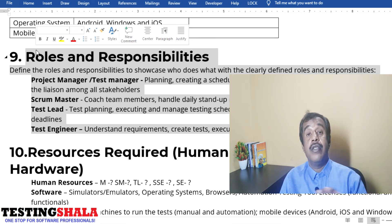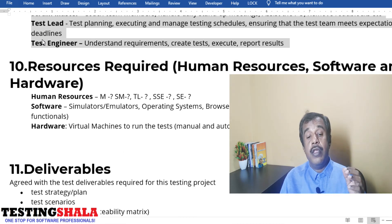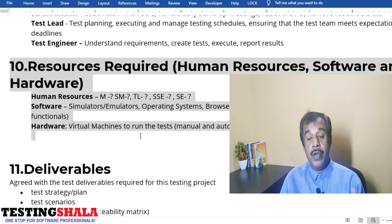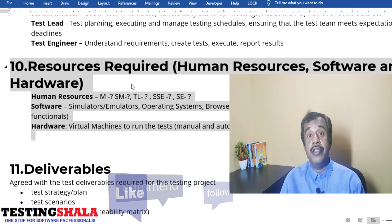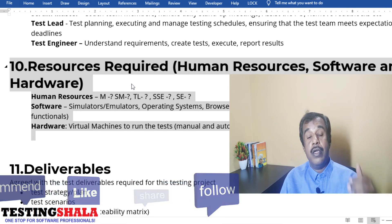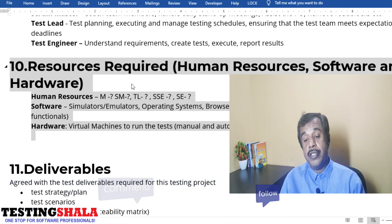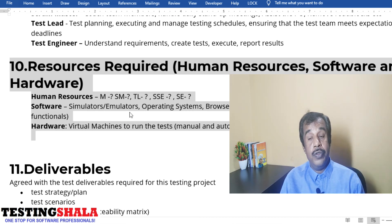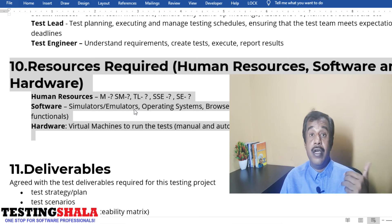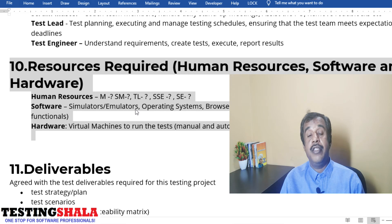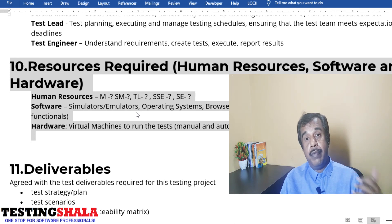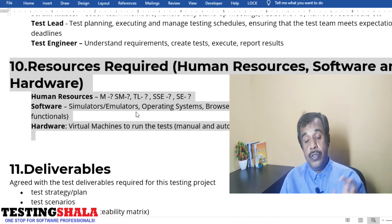Everything should be documented clearly so that when reviewed with stakeholders, everyone is on the same page for successful delivery. Section ten covers human resources — how many resources are required at different levels: TL, SSC, SD, and manager level, and what percentage of each level's work is done in this project. Also document the software required: simulators, emulators, operating systems, browsers, automation tools and their licenses — for both functional and non-functional testing.